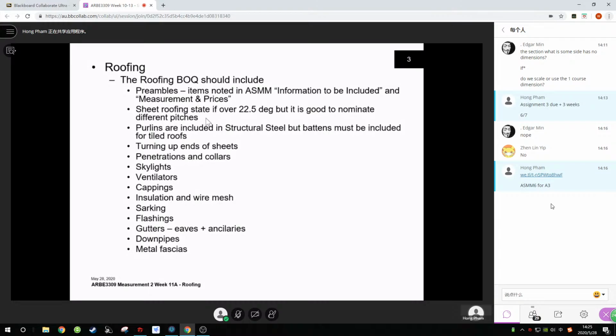There's also a big trick with anything to do with roofing, where roofing is fixed to. Has anyone heard the term furring channels? They're little pressed metal channels that screw onto the frame, and then the roofing or the sheeting is fixed onto furring channels. It's a common mistake in a lot of things, but mainly in furring channels. People will say, such and such wall cladding, fixed to furring channels. Now, if you say fixed to furring channels, that says to me, all right, they're only fixed to them. The furring channels are somewhere else. But what people normally mean is fixed to and including furring channels.